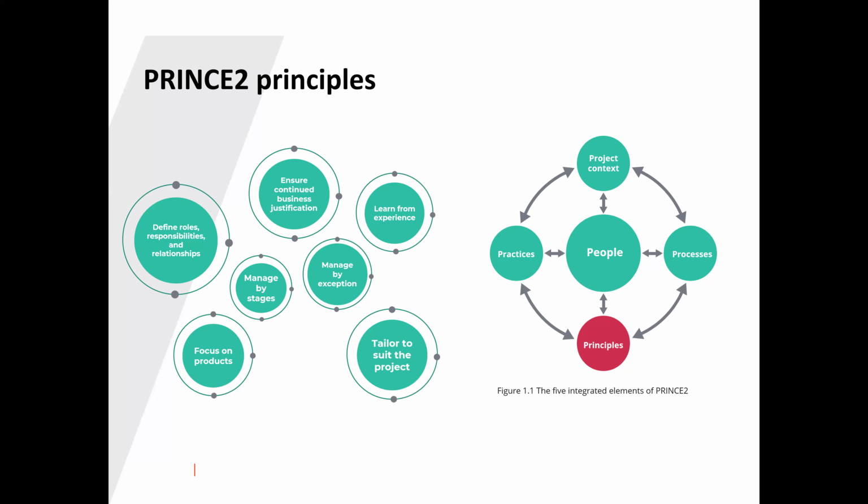Because if we are not managing by stages, the moment we develop the plan, we can just go ahead and start executing. But we said no, just to be on the safe side, just to be sure that we are capturing everybody's interest, let's put a gate there. We can call it a gate or a stage. Then we consult everybody to say, this is what we have. These are the criteria for us to move from that stage to the other.